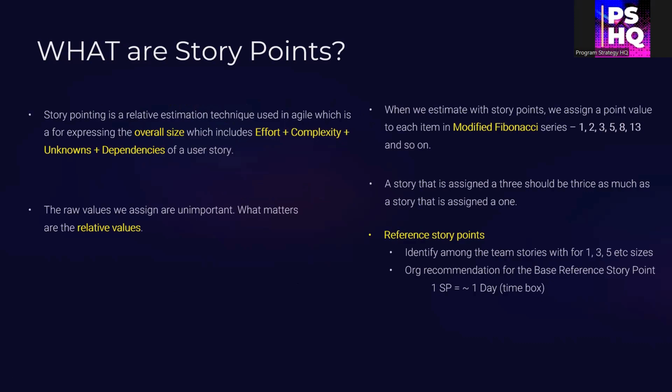There are some absolute estimation techniques, like estimating in hours, which is used in waterfall. Here the keyword is relative estimation. We relatively estimate the current work by comparing it to other reference estimates when we have them. The raw values are not of much importance. What matters are the relative values.